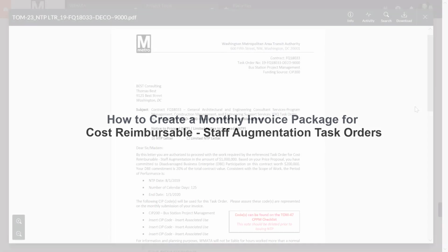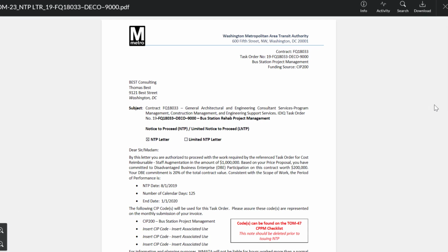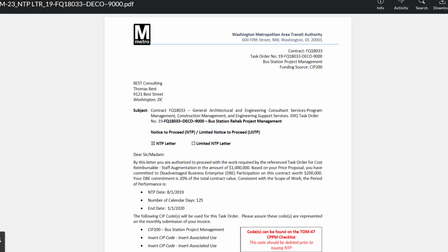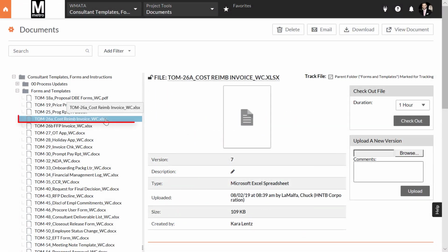In this video, you'll learn how to create a monthly invoice package for cost-reimbursable task orders. If your notice to proceed letter indicates that your task order is for a cost-reimbursable staff augmentation project, you will need to use a TOM 26A cost-reimbursable invoice template.